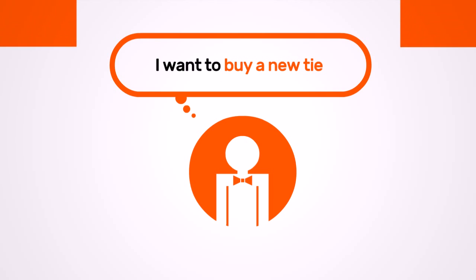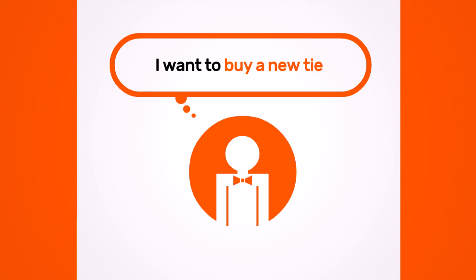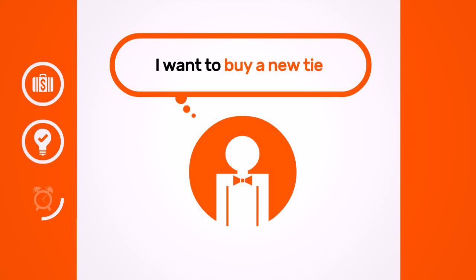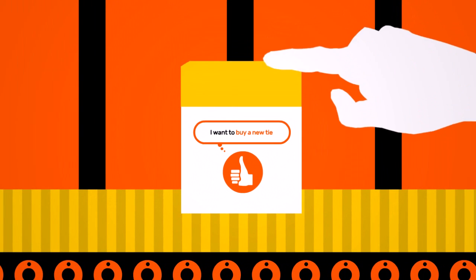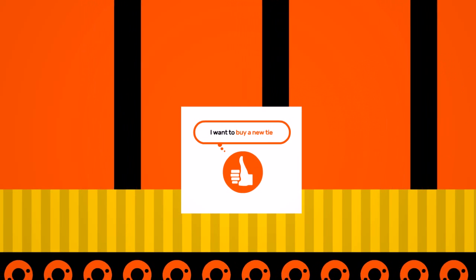Each user story must have the following important traits. Its implementation must bring business value. It must be understandable and testable for our customer. It must be implementable within a short period of time. Approaching a software project in this manner has an essential positive impact on all the goals of our methodology.